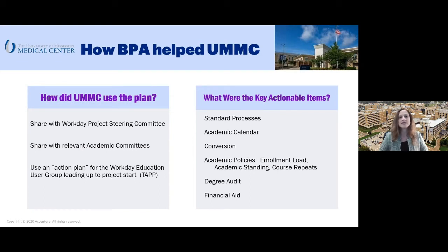So we were able to take this opportunity because it was identified as a critical issue with a high risk. I was able to justify hiring a highly skilled developer that would help with the technical aspects, and it also helped our functional team direct some of their focus before the start of our project to cleaning up our data and minimizing some of those challenges we expected to face.